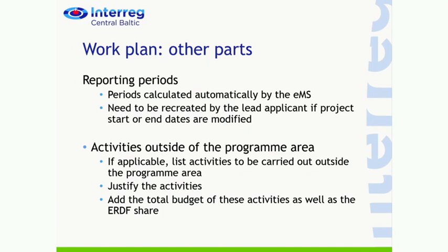Then you may also have activities outside of the program area. Let's say you are going to new markets somewhere in China and you are organizing events there to promote your products to achieve sales. Those costs that occur in the destination country, they fall under this category, and you should estimate the amount in this field and justify the activities, of course.